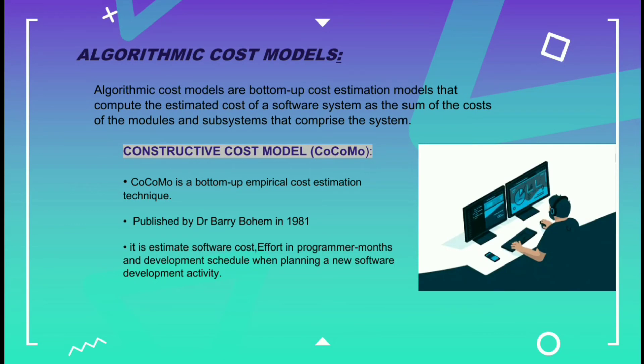Algorithmic cost models are bottom-up cost estimation models that compute the estimated cost of a software system as the sum of the costs of the modules and subsystems that comprise the system.